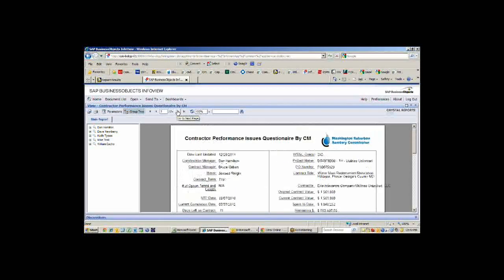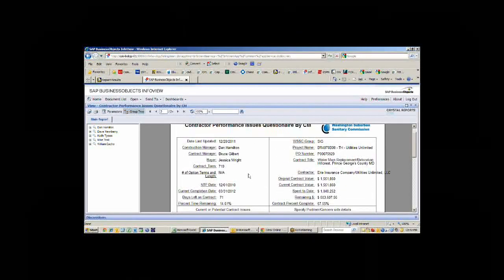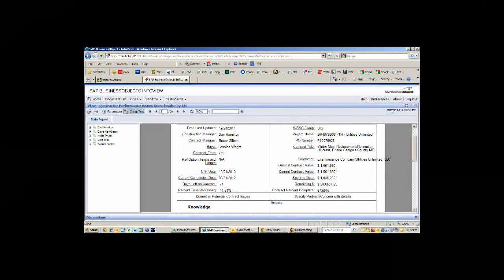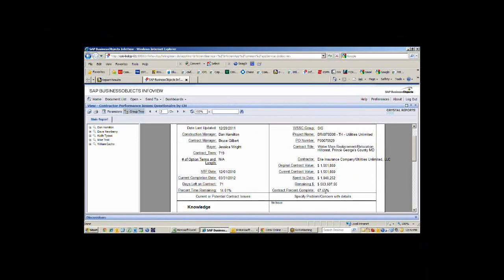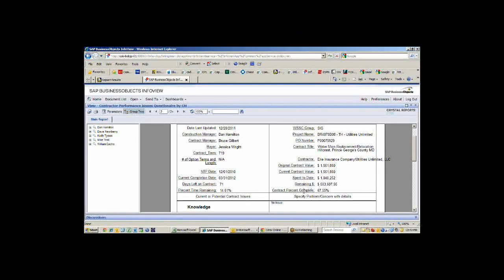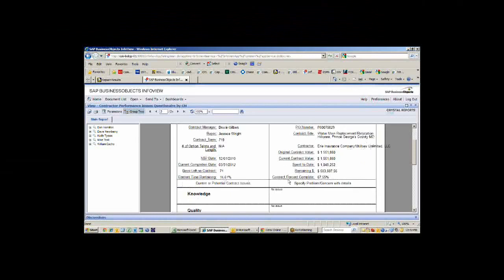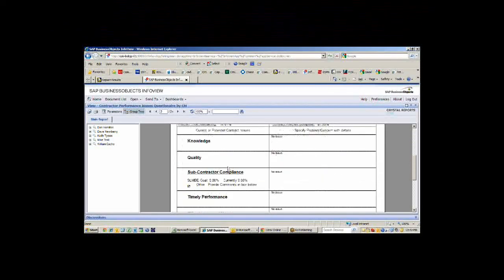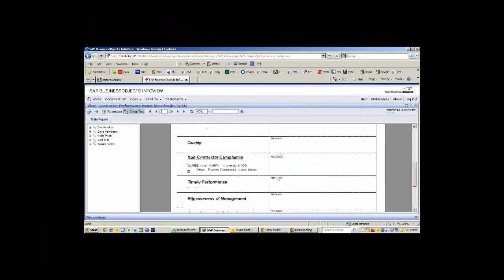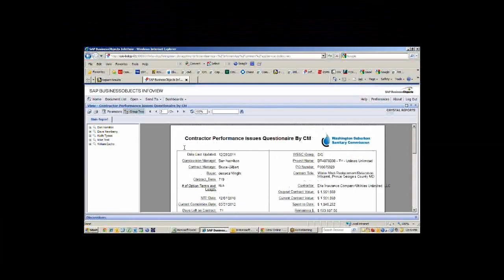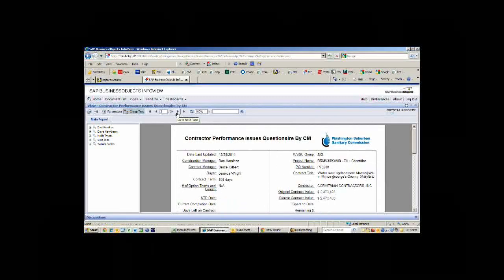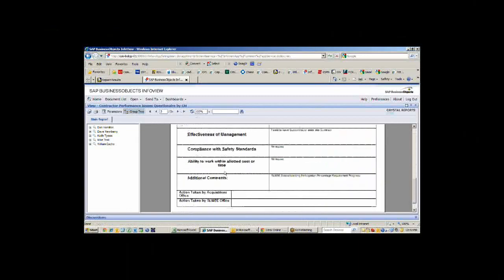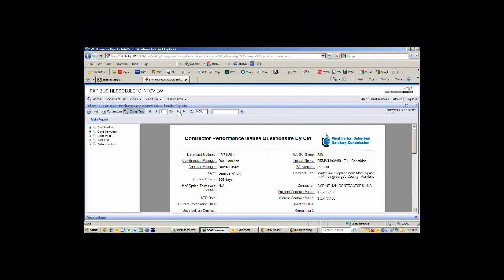Here's a water job. You can see that they've got 14% of their time remaining and they've spent 67% of their money. So they've got a problem in that they're probably not going to finish running $500,000 in the 71 days left on the contract or it's going to be pretty tough. We can look down through here and see if there's any issues. In this case, they don't seem to think so, but maybe we haven't looked at that one hard enough yet. We can run through every project this way and look at all the details of everything that's going on.